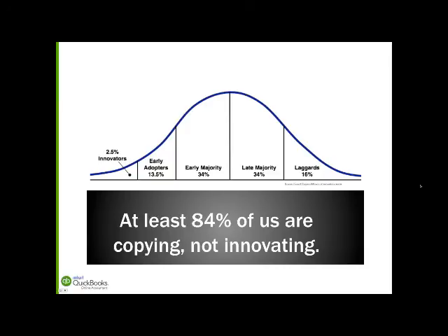If you read Ed Kless's article, you're going to learn how to forecast whether a job is going to come in by its due date. And that's by looking forward, not backwards with timesheets. That's by tracking tasks and whether they are being completed by the expected due date. That's what you need to track. So no, you don't need to track hours, track duration.